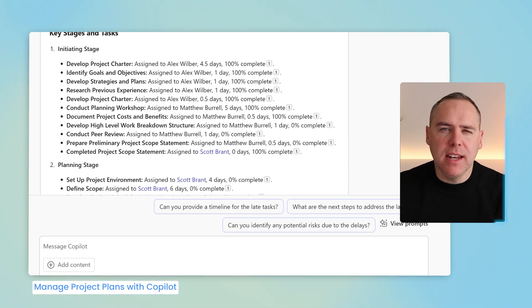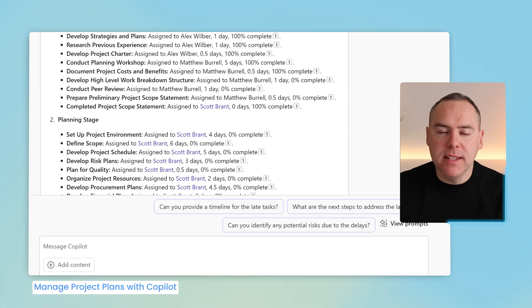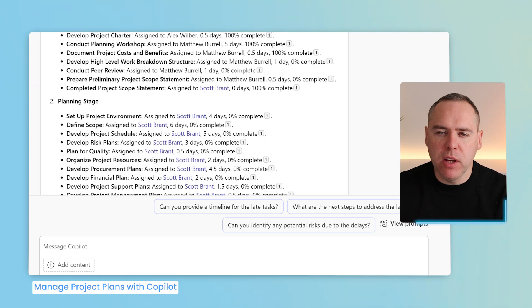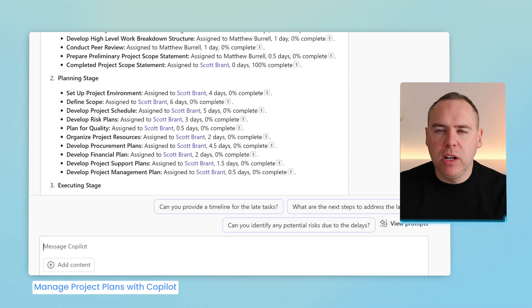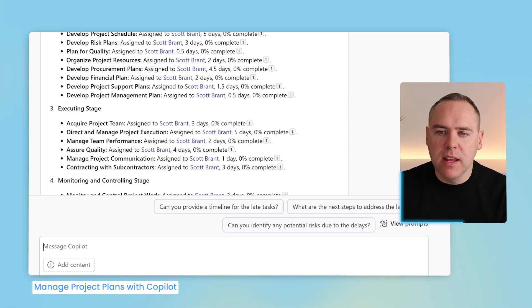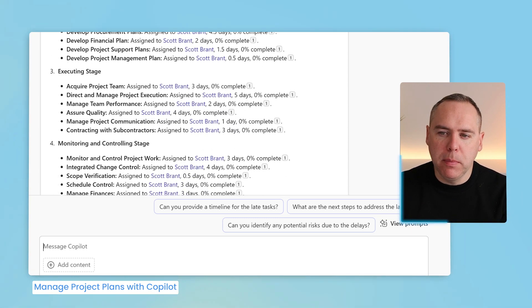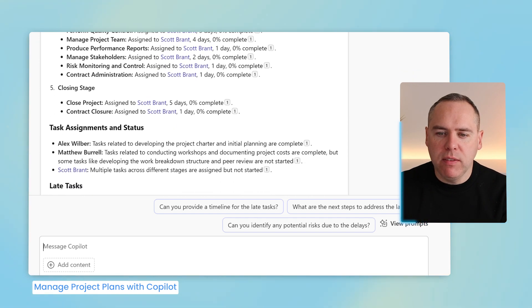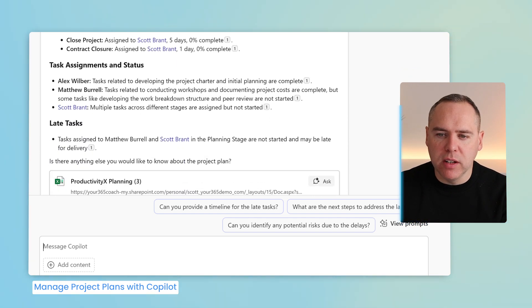And we can see in real time that taking that Excel file with my prompt, Copilot has now provided a simple project overview, outlining all the key stages and tasks and who they're assigned to, the percentage complete and also any relevant other information.